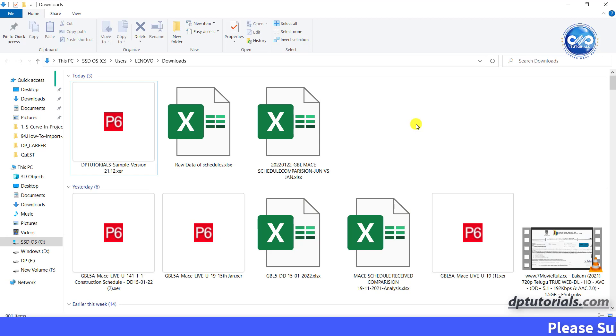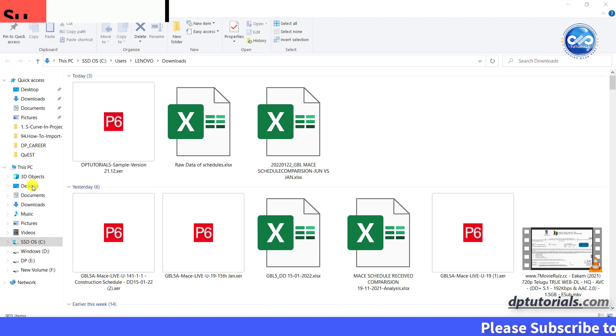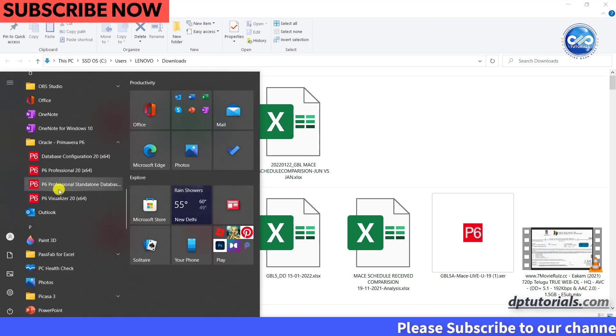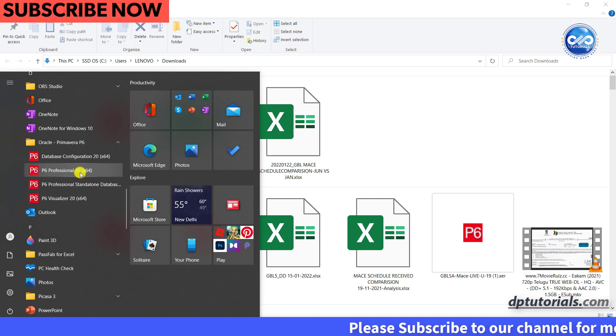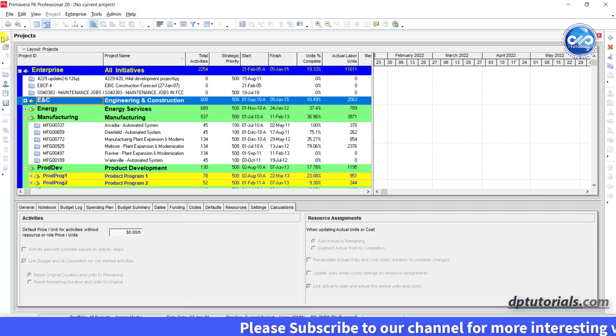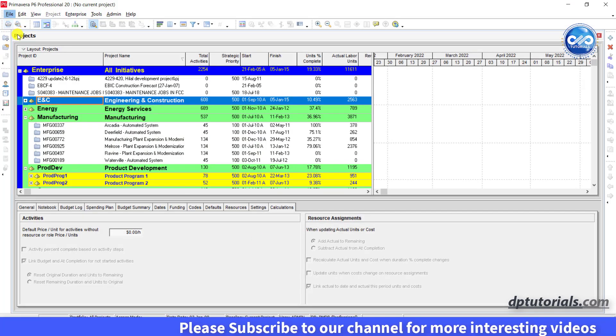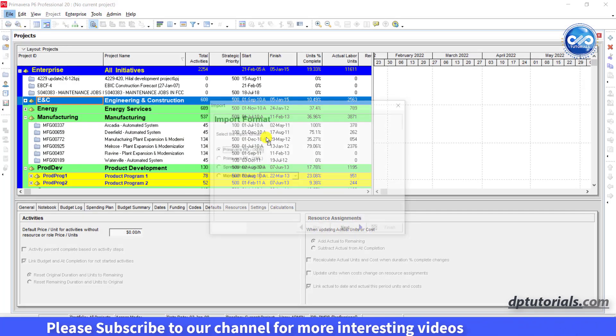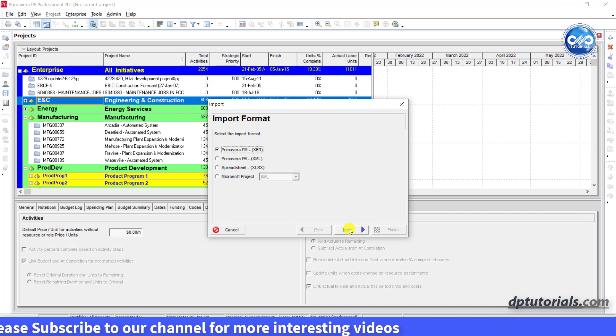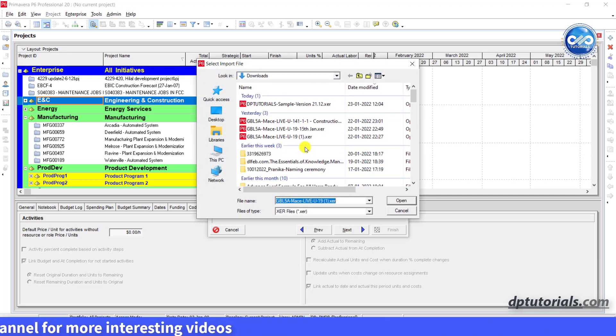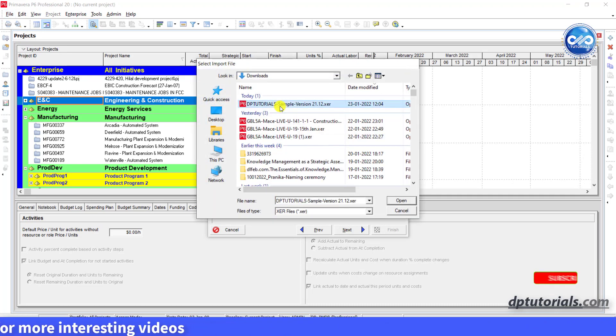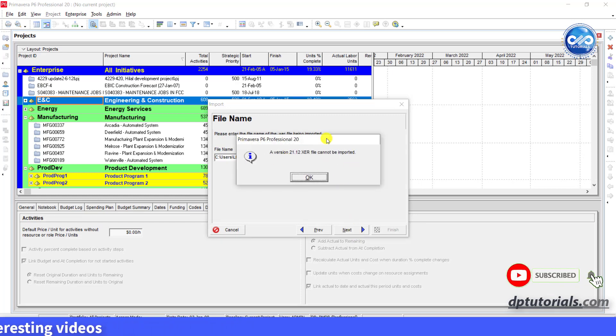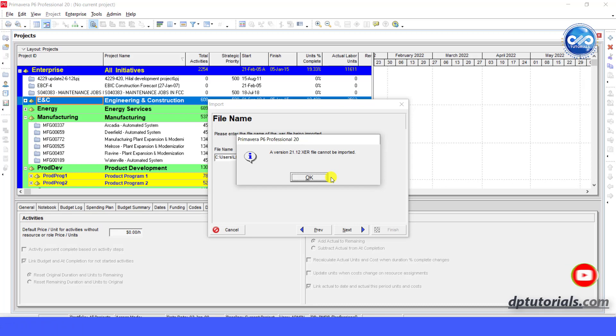This is a sample P6 schedule of version 21 and let's try to import into my Primavera version 20. Click on import. Browse the version 21 file. When you click next, it will display an error message like this. A version 21.12 XEA file cannot be imported.